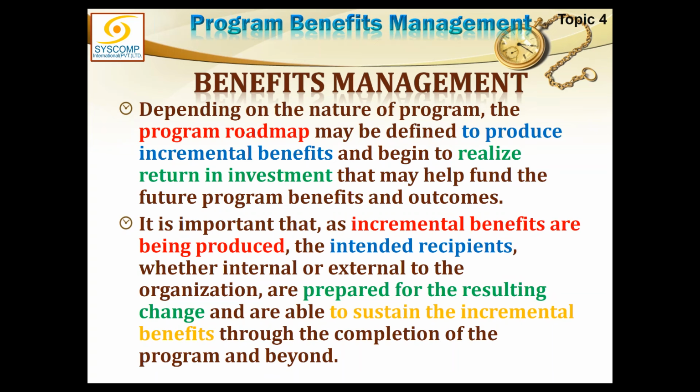So if we can do the incremental benefits, we can begin to realize a return on investment. That may help fund the future program benefits and outcomes. It's not only the organizational capability we are creating. Even within the program itself, if it is a 10-year long program, maybe after 2 years, the program becomes self-sustaining and starts feeding money to the next stages. So the subsequent benefits may be getting their funding from within the program.